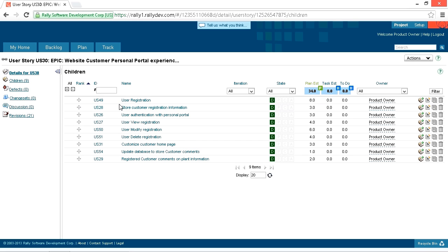The I in the INVEST guidelines stands for independent, where each user story can stand on its own and can be developed, tested, and delivered independently. Related but independent user stories can be combined within a single sprint, or they can be split across different iterations, depending on their priority. That's the flexibility delivered by writing independent user stories. And with independent user stories, the product increment will be potentially shippable at any point in development without requiring or being dependent on another user story's functionality.